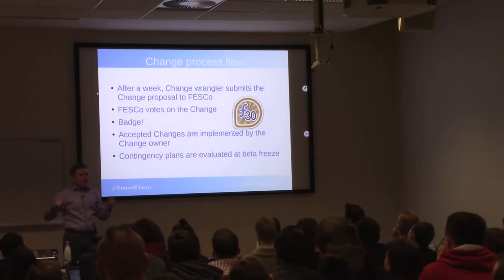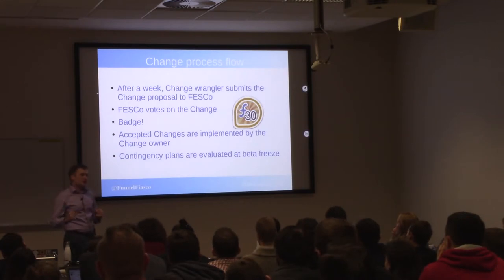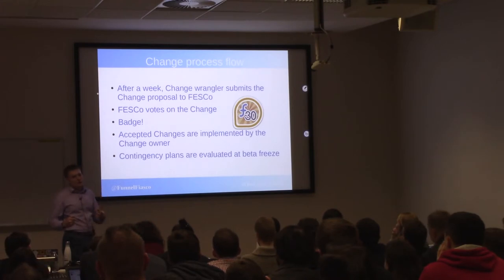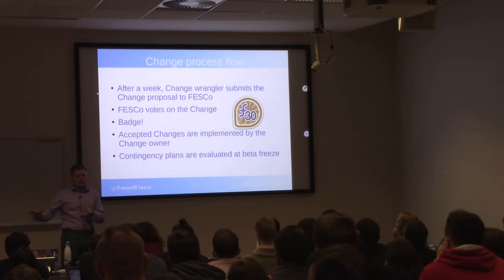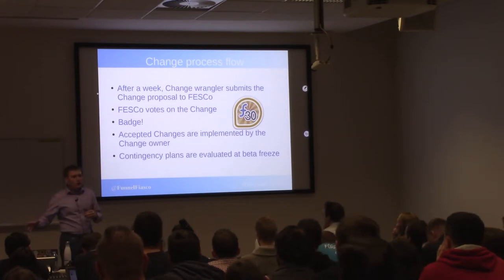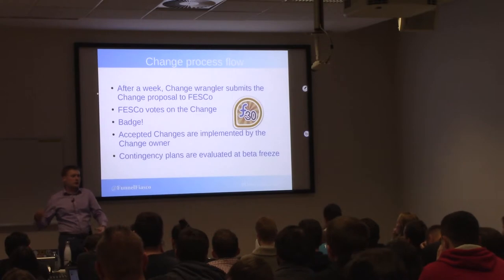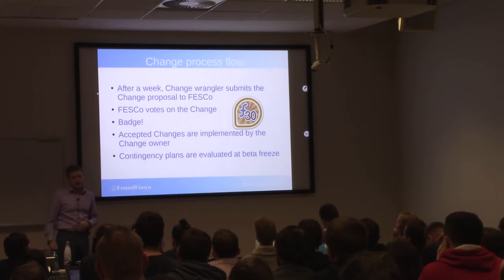At the beta freeze, we look and see which changes are actually done. If there are ones not yet finished, we look at their contingency plans and FESCo decides: do we give you a little extra time, do we grant a freeze exception, or do we say "sorry, try again in the next release"?